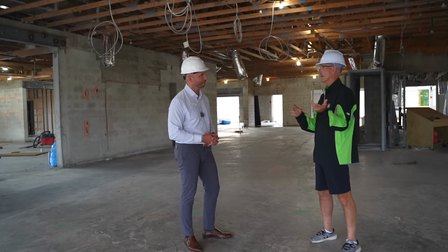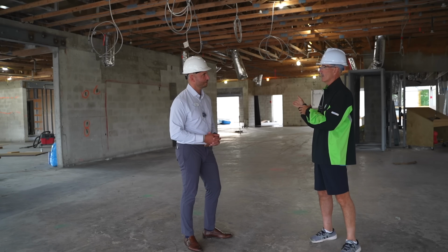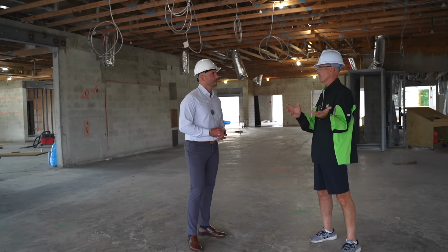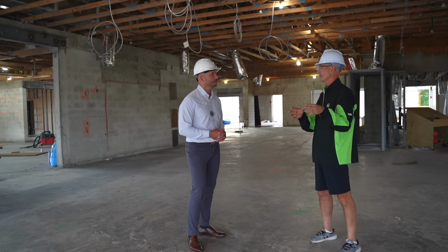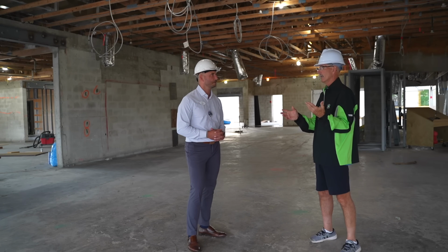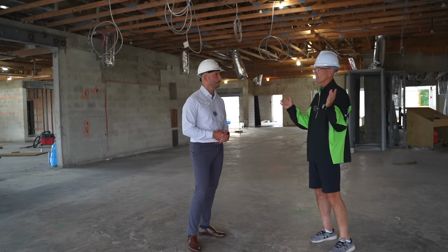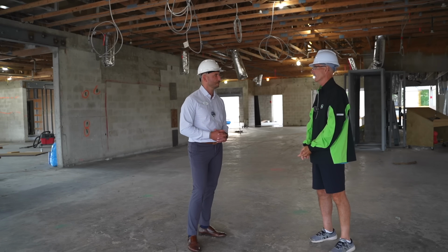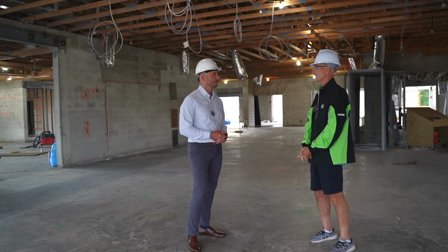And that's for the whole job. First, we had an early delivery at one end and a later delivery at the other. By the time we got all the fabrication drawings corrected with all the correct information on them, they were re-engineered by the manufacturer. So now we're just going to ship everything at one time. They're being fabricated, I think, in the Sarasota area, and a short drive down here.